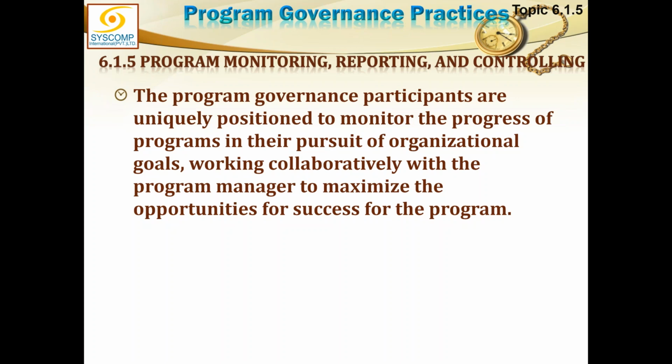Program governance plan is translated into the project management plan. Day-to-day working is the job of the program manager, and that is enclosed in the program management plan. Program governance plan is not created by the program manager. Program governance plan is not the responsibility of the program management plan. Program manager is responsible for creating the project governance or component governance framework or the plan, which he will give to the respective project manager and leave it to the project manager how he translates it into his project management plan.